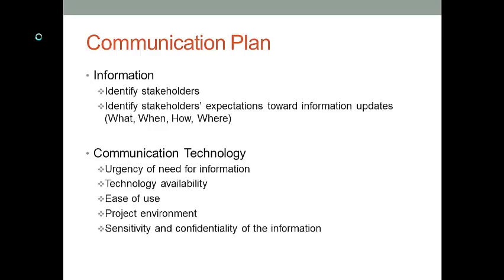Let's say you are managing a project. Your team members are around the world. At this moment, synchronized communication technologies, such as online chat and video conferencing systems, shouldn't be the primary communication technologies you use. Why? Because your team members are staying in different time zones. It would be difficult to organize a communication or meeting activity at the same time. Asynchronous systems, like emails, SharePoint, and cloud computing systems, should be the primary communication systems you want to use.